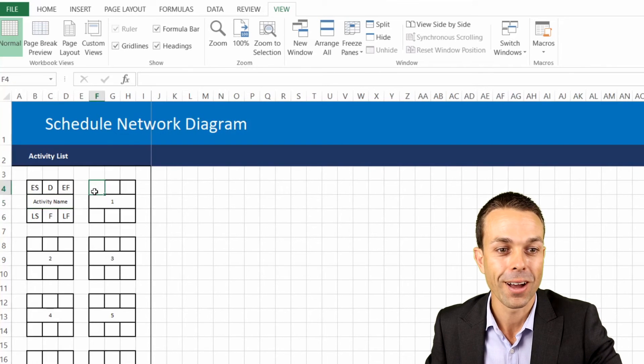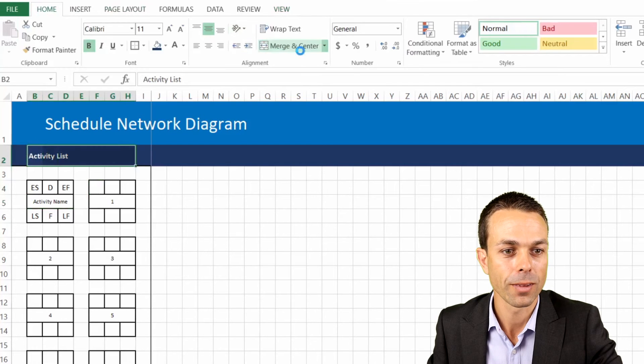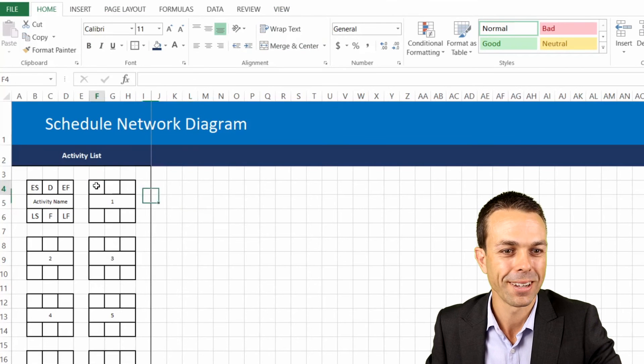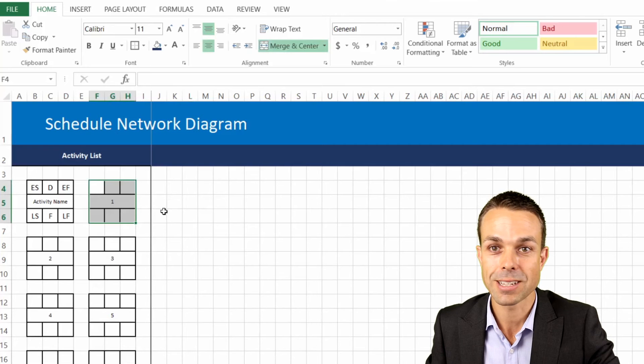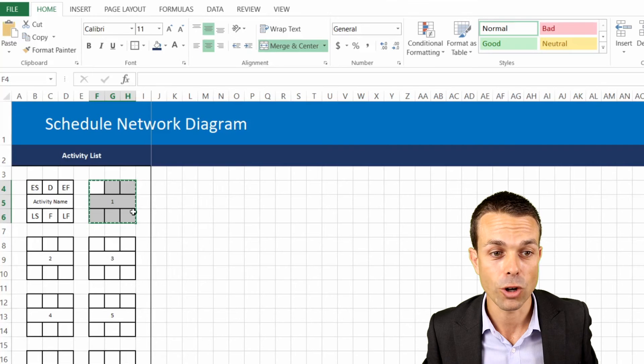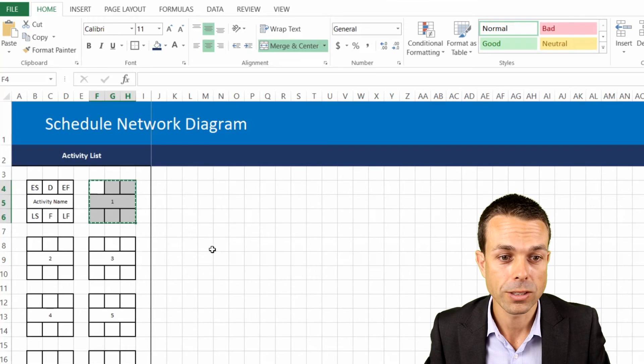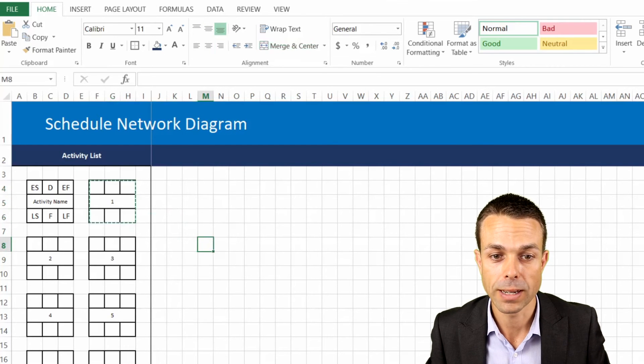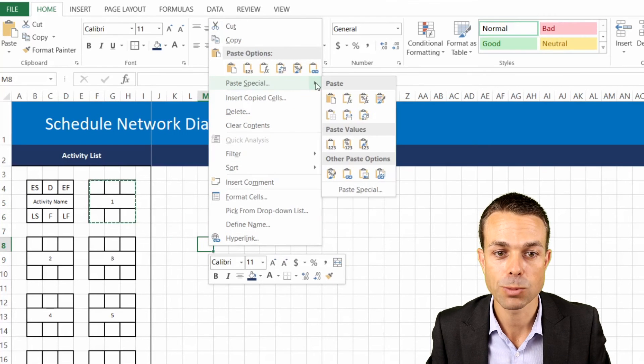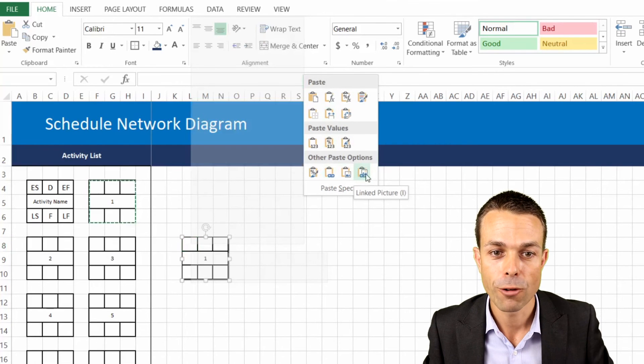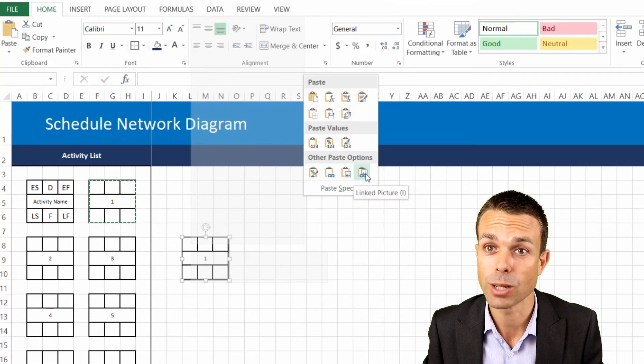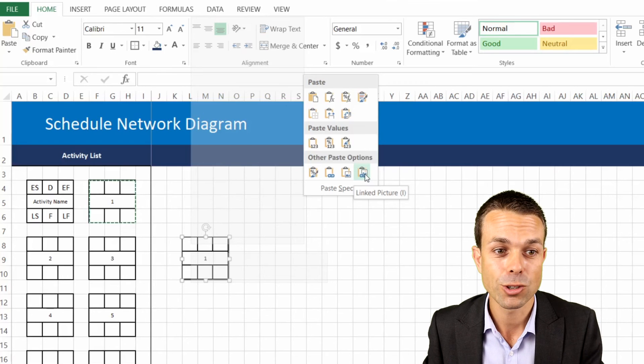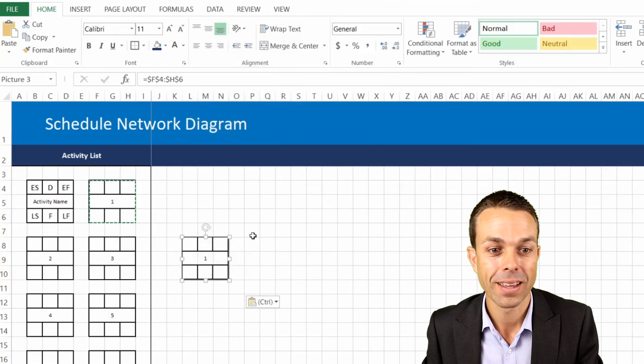Okay now we get to the really good stuff. So we've got our first activity over here and I'm just going to go Ctrl+C and copy that. Now what we're wanting to do here is move over into our workspace and if we right click what we're wanting to do is paste special. And if you see here we have an option for a linked picture. So this is going to come up as a picture in our workspace so we can move it around but it's linked to our original activity list so everything we change in the activity list will impact the picture.